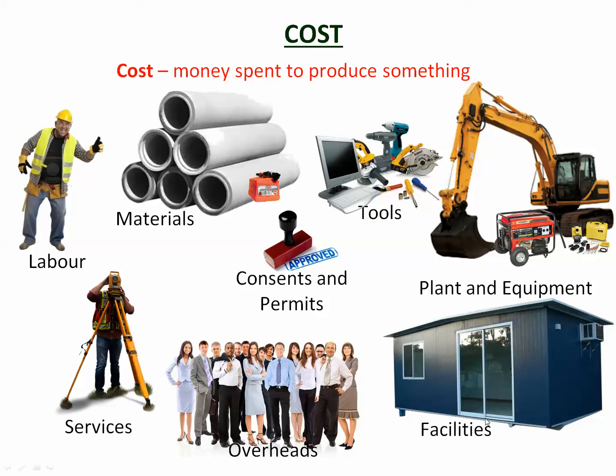Facilities, the site offices, the toilets, everything you need to sort of run the site, the access. And the overheads, these are the things that you need to run your business. So all of those things are costs, and there are many more. Now that's just for a construction site.